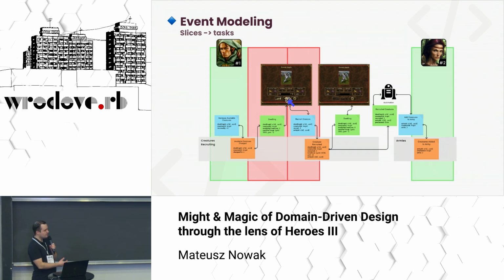And when the slice on the left-hand side is done, we have unlocked the next slices to work on, like levels in a game. We can do tasks that depend on the slice which is already done. So what have we unlocked? We unlocked the read slice because it depends on the event from the previous slice. So it's the only contract between those slices. We can proceed with the development. Or if we follow the CQRS pattern, we can do even the next parts of the command side, because the command side doesn't depend on the query side.